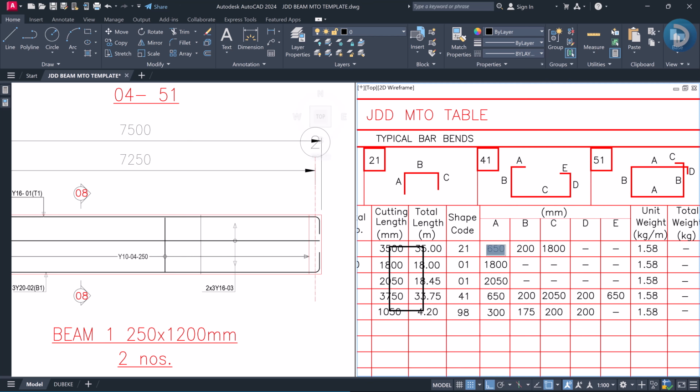So against using 344 for my side A and my side C, I will take a length of 350 millimeter, right? And I'll also take this to be 350 millimeter. While for this part, after subtracting the concrete cover from the left and right, I have this to be 7420.